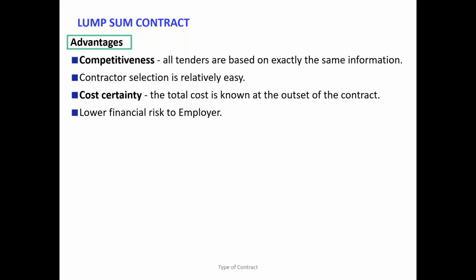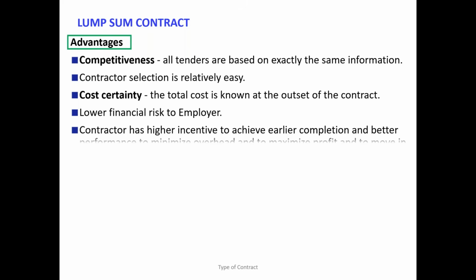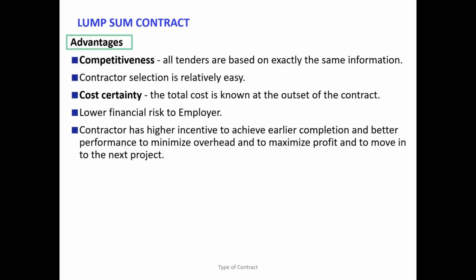So therefore, what happens? The contractor tries to complete the project a little bit early. Why? Say, for example, the contractor agrees to complete the project within 12 months. It is a villa project, assume. If the contractor completes the work by the 11th month, will you pay the full amount or not? Is there any doubt? You will pay. You can't say otherwise, that is a wrong argument.